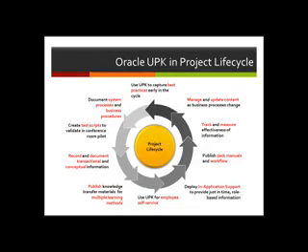And this next slide kind of talks to that in terms of being able to put into practice what I've just suggested: by using UPK to capture best practices early in the cycle, using that to build documents on system process and business procedures, use those to drive the test scripts, and then record and document what happens during the testing, and input that into some of the other materials.